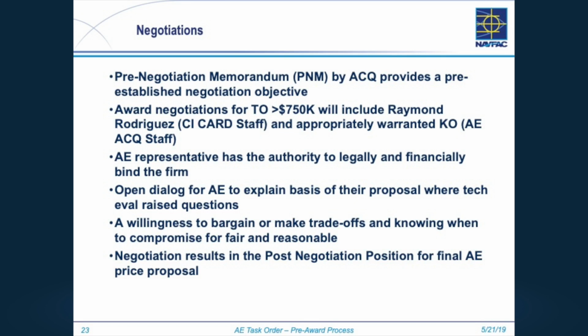The starting point, the document that we talk from, is their P&M, which is your 4-column spreadsheet. And in the ones I've been in, we go straight down, okay, accept. We want to talk about this one. You said 12, we think it should be 6. Tell us why you think it needs to be 12.